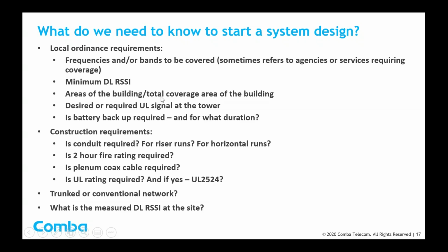What areas of the building need to be covered? What's the total coverage area of the building? What is the desired or required uplink signal that the ERRCS system will deliver to the tower? Is battery backup required? And if so, for what duration?